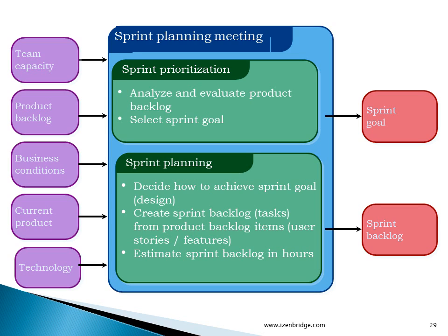So if we see a sprint planning meeting, it has two buckets or two segments. The goal of the first segment is to select the business features which can be developed in the coming month, or coming iteration, or coming sprint. And the second section is, okay, we have selected these 3 items. Now how are we going to convert these 3 items into a running functionality? Let us break those 3 items into engineering tasks, and let us estimate ideal hours against all those engineering tasks. So this is all that happens in a sprint planning meeting.